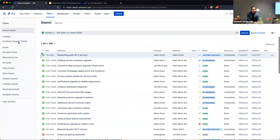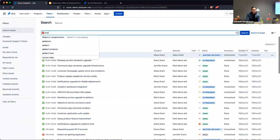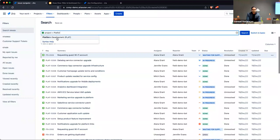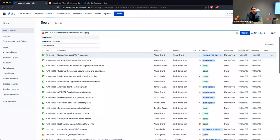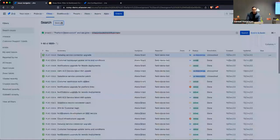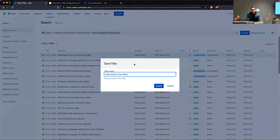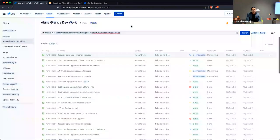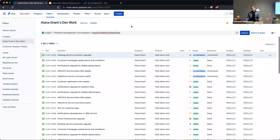You can write a query — something simple like project equals Platform Development and assignee equals Elena Grant. I could save this as 'Elena Grant's dev work.' This isn't a best practice; you'd want to use the current user function if you want to make it reusable, otherwise it's specific to that person's work.